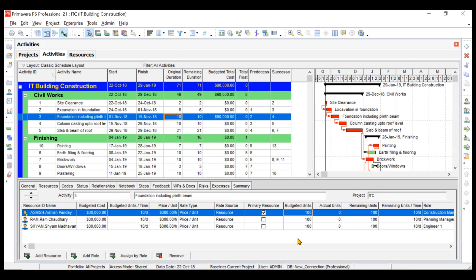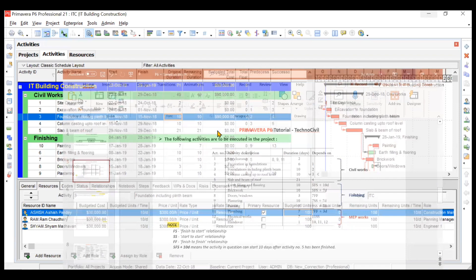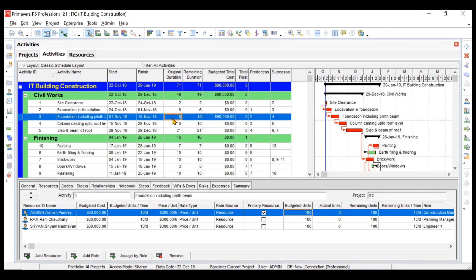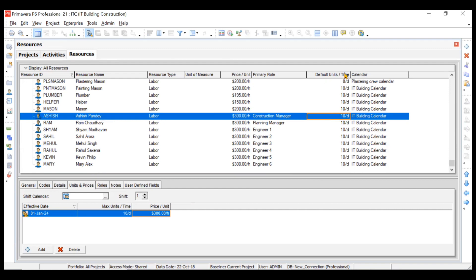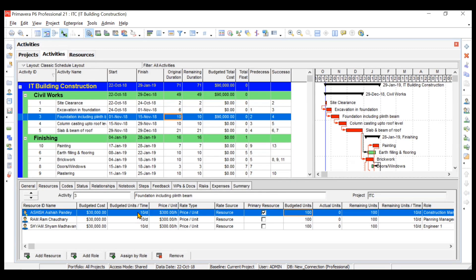Now let us verify all the original durations are correct: 2, 6, 10, 10, 21. For Ashish, the budgeted units per time is 10 hours per day — 10 multiplied by 10 days gives 100 budgeted units. Actual units are 0 because we have not marked the progress of this activity, and remaining units is 100. So the cost is 300 multiplied by 100, which comes to 30,000. Similarly for Ram Chaudhary and Shyam Madhavan.